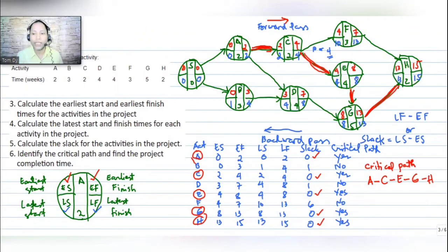Therefore, that is our critical path. Comparing with other paths, we only have 3 arrows. So this one is 4 arrows. So that will be our critical path. So that is another way of identifying the critical path. You have to count only the arrows connected from each activity.